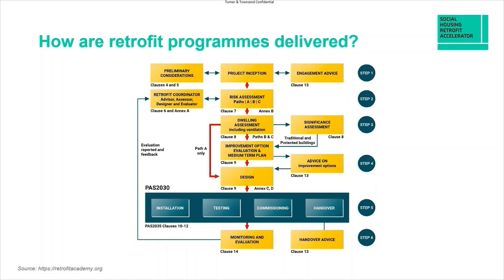Step two is identifying the risk rating of the property, falling into A, B or C from low to high risk. The risk assessment comprises five criteria: the number of homes in the project, the number of measures per home, the inherent technical risk of individual measures, the highest risk combination measure, and the principle of construction. Step three is undertaking a dwelling assessment, generally commissioned by the retrofit coordinator. Each dwelling must be assessed with a report available to present findings to the building owner — including recommended measures, energy advice, and carbon and cost savings. This needs to be signed off by the retrofit coordinator to ensure compliance under the PAS 2035 criteria.